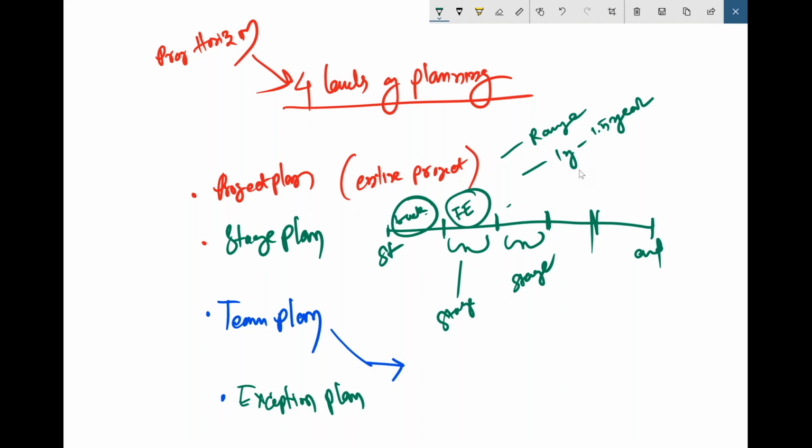You'll have clarity when you split that into front end and back end. Next, you want to manage interactions. It could be your third stage. And maybe your fourth stage is something related to deploying it. So it could be something like this. What you will do is you will have clear-cut ideas on what you need to achieve at the end of that particular stage. Each and every stage you are seeing here will be more detailed, and that more detailed thing is called a stage plan.